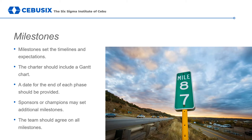Previously, we covered creating a draft schedule for a Six Sigma project. A Gantt chart is the most commonly used tool for scheduling. It is a bar chart that displays the phases of a project according to time. One of the benefits of using a Gantt chart is that it can be easily included in a one-page project charter, allowing anyone reviewing the charter to quickly visualize the time element required. Teams should ensure a date is provided for the end of each of the DMAIC phases and that all team members agree that the dates are plausible. In some cases, milestones might be set by the project sponsor or champion, but the team should also agree that milestone dates are possible.